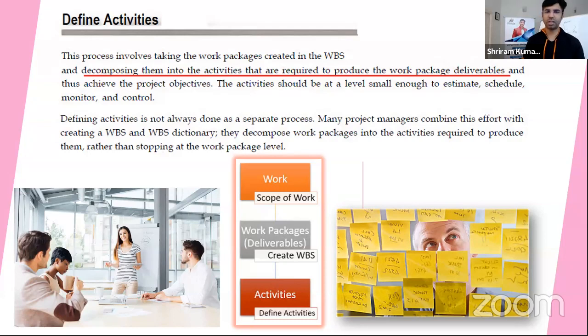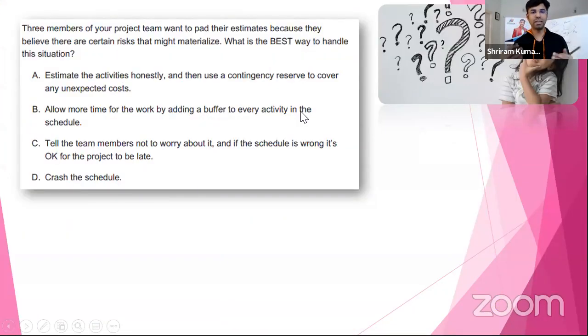You can see in the picture they have sticky notes. I may give one package to the team and ask them, can you make this into further pieces? Now they start doing that as activities. So activities can be done primarily by the team. In fact, it should be done by the team so that the buy-in and mindset will be collaborative. If it is done at the managerial level, chances are the buy-in will be very low.